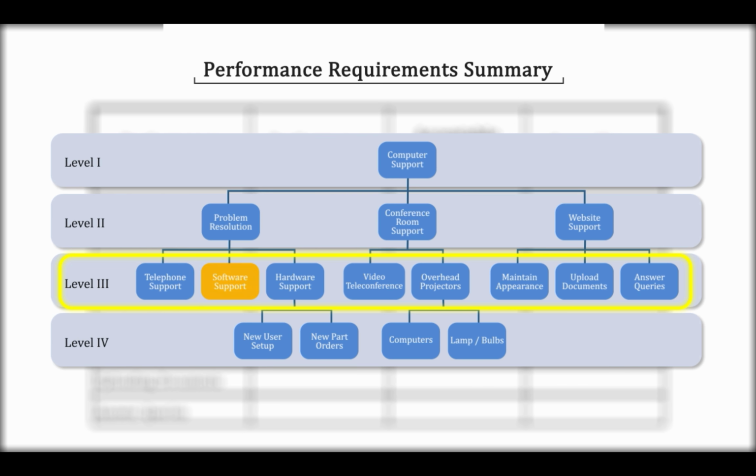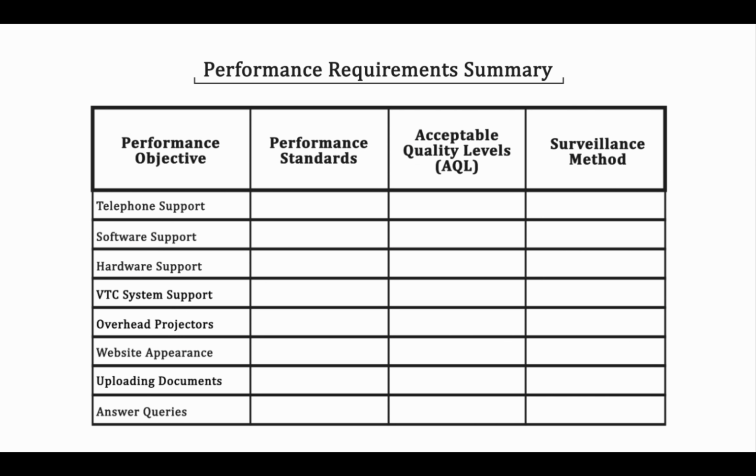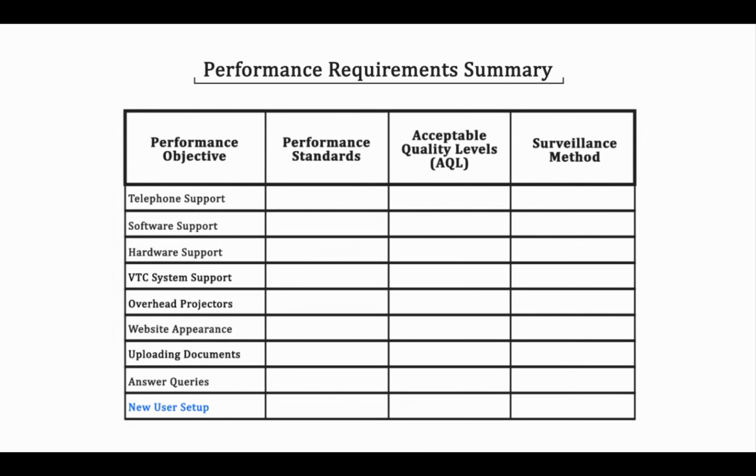Telephone, software, and hardware computer support are very important, so I will want to ensure we conduct quality assurance inspections on those. My commander informed our team that when new employees come into the organization, it's been reported that they have been sitting for days not working because their computers are not set up. And he asked us to begin monitoring progress in this area on the next contract, so I will add new user setup as a performance objective.